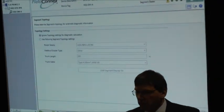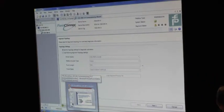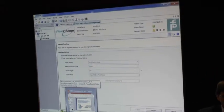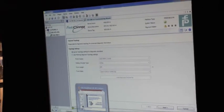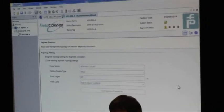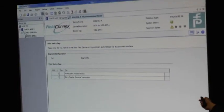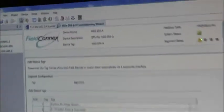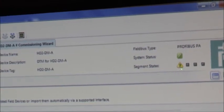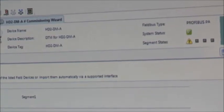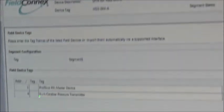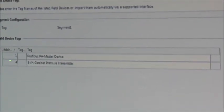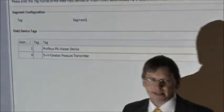So now we can type in what kind of junction boxes are used, how long the cable is, and so on. For the test, for the demo, I really don't know. But I have here a message. The message says at the moment my segment status is, it says out of specification. So something should be wrong, but we do not know at the moment what. So we found here our pressure transmitter from Endress+Hauser, this address 4. So it is actually working on the segment.